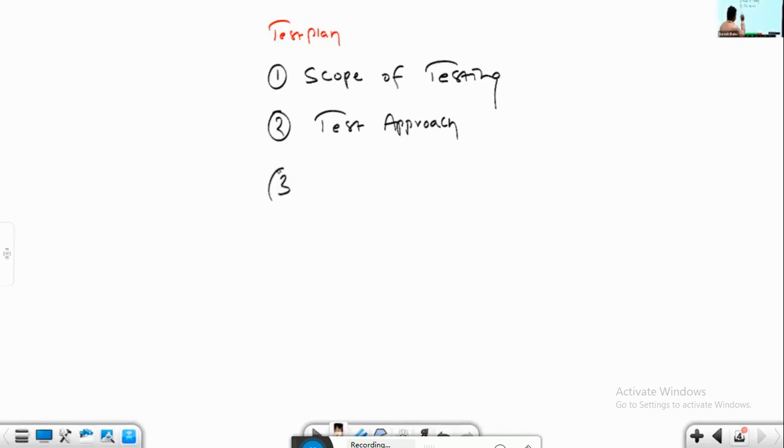Sir, we discussed sprint planning in the Agile model, right? Are the test plan and sprint planning both the same? Every work will have a plan. Let's say there are about 40 requirements in the admin module. Rather than planning all 40 requirements under 1 or 2 months of schedule, in sprint planning only 4 to 5 requirements will be planned for 1 week of schedule. But either waterfall model project or agile model project, planning is a must.